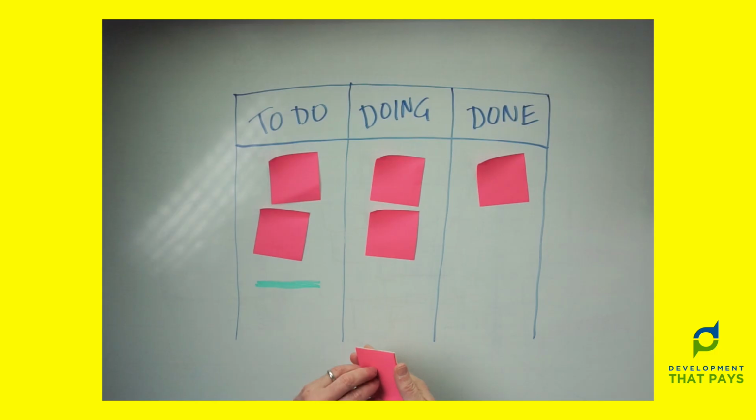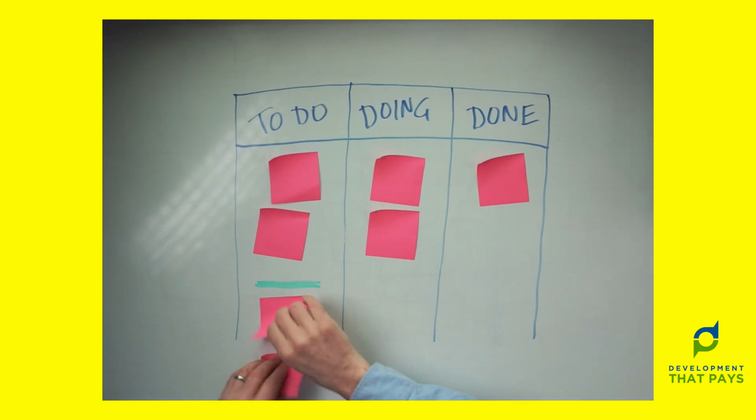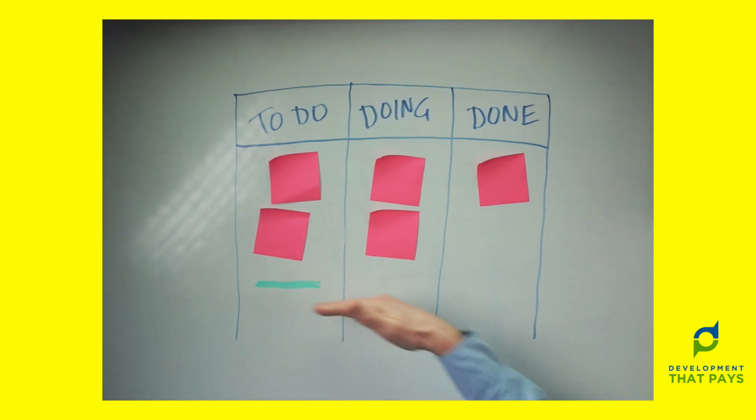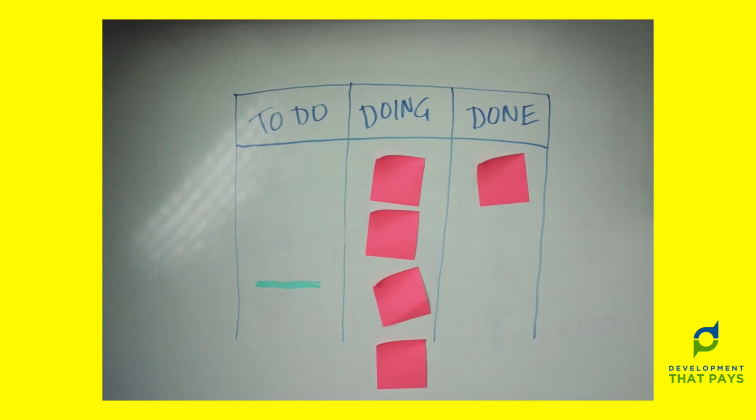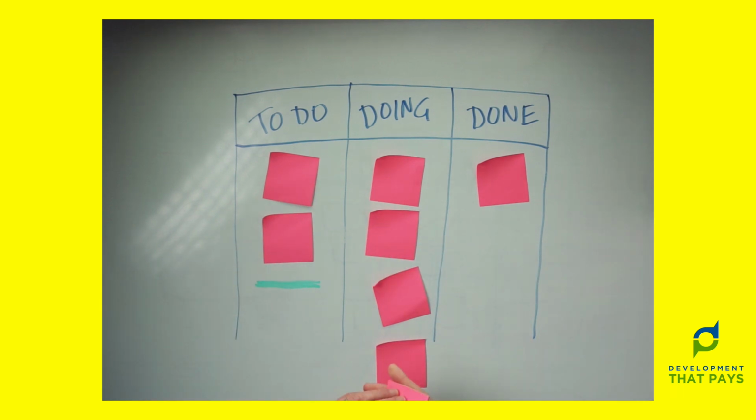And typically it takes a while to get the meeting together, to run the meeting, the result of which will be more items for the to-do column. And the idea is that if this is the state when the meeting is called, there's enough work to carry on with if it takes, say, a day or perhaps 2 days to get that meeting organized. So maybe this one gets picked up in the meantime, this one also gets picked up. And then finally, the result of that planning meeting would be some extra work that would hopefully fill up this column again. Trigger point.